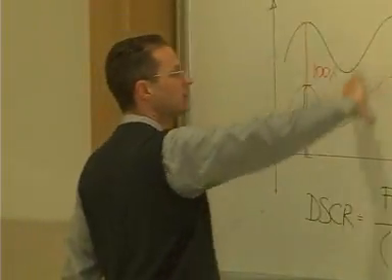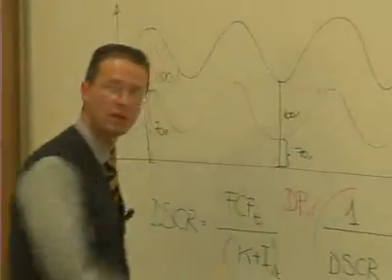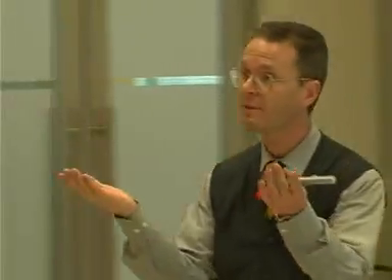So if you fix a minimum required dedicated percentage this way, you are also negotiating the minimum debt service cover ratio that will be assured every year of operation. Because if you look at the graph, the distance between these two curves is always constant. Okay? You can interpret the 30% as the debt service cover ratio.